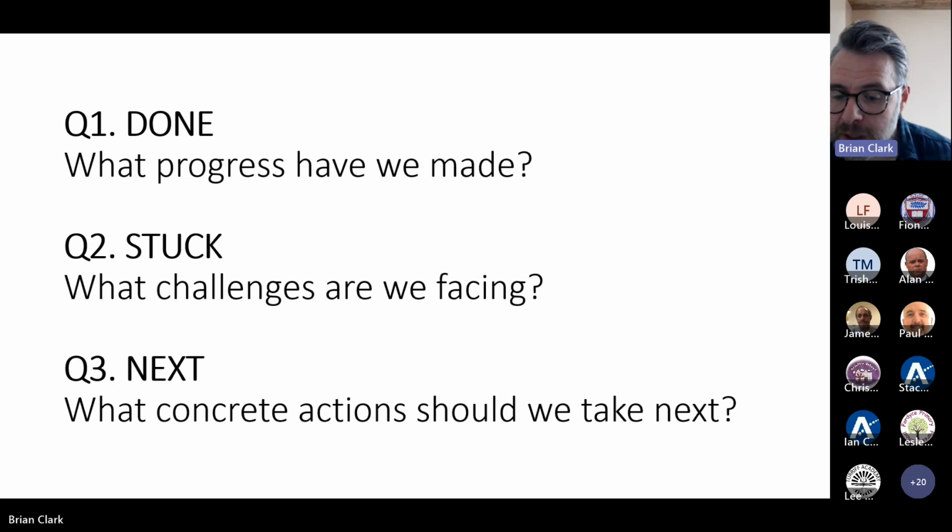So the whole process of lean monitoring is about responsive action, about the planning and identification of tasks, people, resources, understanding where there might be challenges and planning for how you might fix those challenges should they come up, then putting in place something visual, something public that celebrates success and progress on a frequent basis, and then catching up with those involved in the entire project on a frequent basis as well.